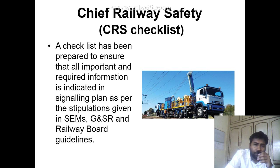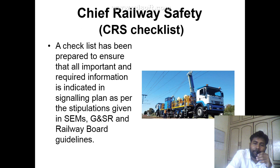Next is the CRS checklist. This is the last document prepared after completing all the work and before commissioning. A CRS inspection is conducted and a checklist is prepared to ensure that all important and required information is indicated in the signaling plan as per the stipulations given in SEMs, GA, SR, and railway board guidelines and authorities.